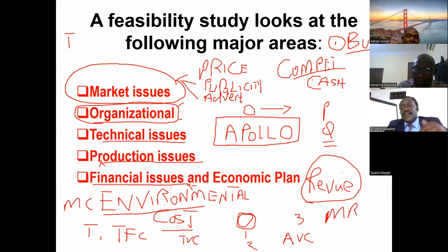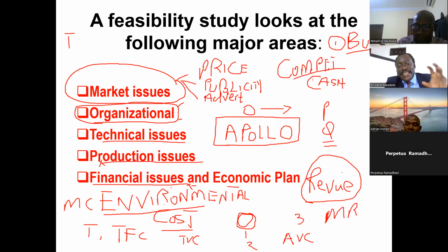For funding a feasibility study, you need to request funding from the concept note. So make sure you include in the concept note that, based on this concept, we expect to carry out more analysis on the feasibility study that relates to this dream you are talking about. Before we prepare write-ups for more information, we want you to fund the process of preparing the feasibility study.